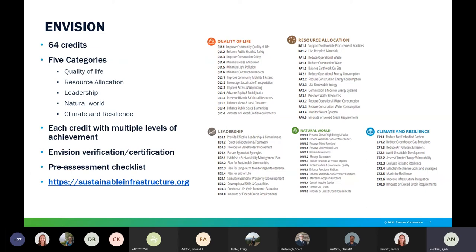The client may choose to pursue an Envision rating through verification by ISI, who verifies total points achieved. Upon verification, the project is certified as verified, with ratings going up to silver, gold, and platinum — platinum requiring about 50% of the total achievable points. Alternatively, the client may use Envision as a tool to meet project, program, or corporate goals. For example, a pre-assessment checklist can be completed early in the project to assess sustainability indicators and develop goals. For more information, visit the ISI website at sustainableinfrastructure.org.